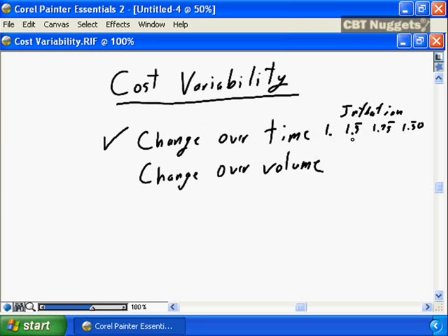If you need to buy technology, if your project is going to involve buying computers over the life cycle of your project, with the cost curve for computing power, chances are buying computers later in the project life cycle will cost less than buying computers early in the life cycle, simply because the cost curve for computing technology is continually going down, continually favoring the buyer as opposed to the seller.